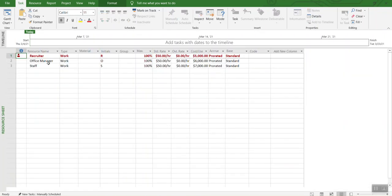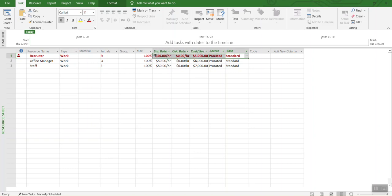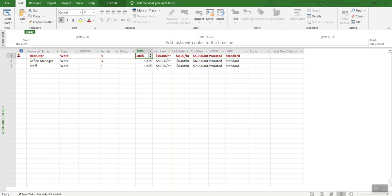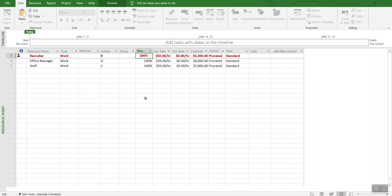One thing I do want to mention - it's now indicating that you are using the recruiter for all these tasks, but you do not have enough resources. Maybe we can say that 100% is for one person, so we can say 200%. We have two resources for recruiting tasks. Now it is 200% and it's not red anymore. We are not lacking any resources.